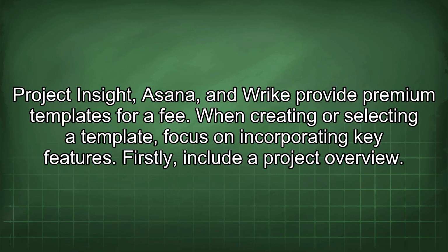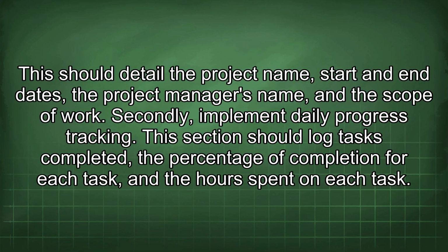Firstly, include a project overview. This should detail the project name, start and end dates, the project manager's name, and the scope of work. Secondly, implement daily progress tracking. This section should log tasks completed, the percentage of completion for each task, and the hours spent on each task.